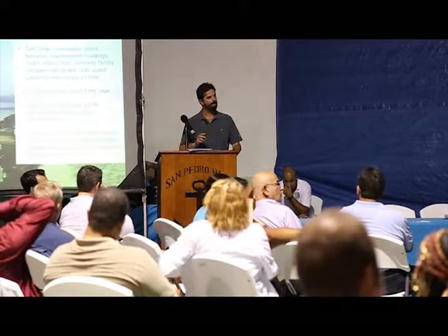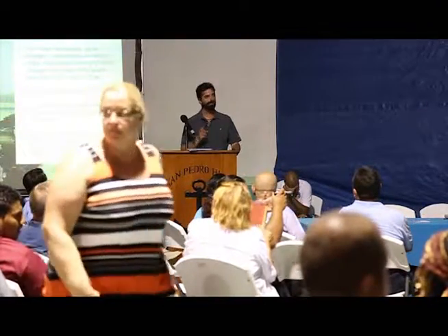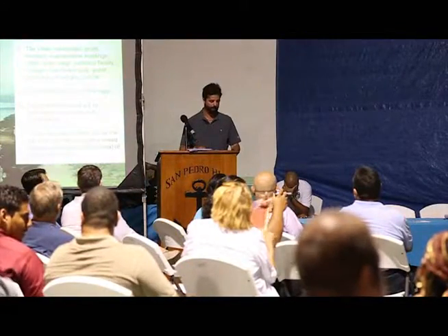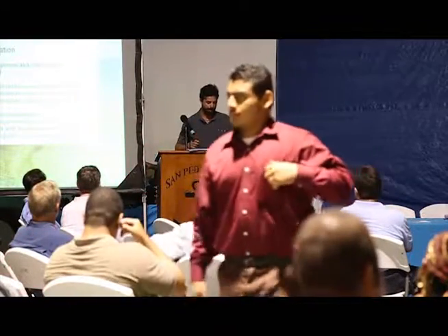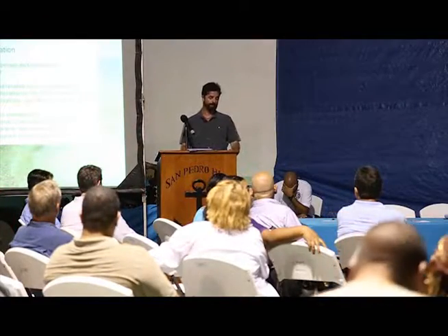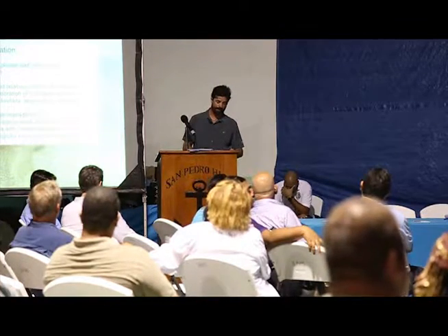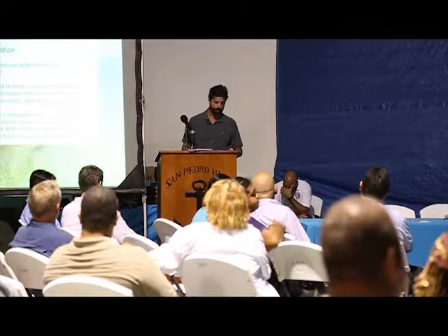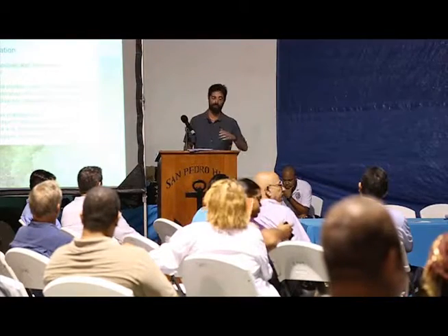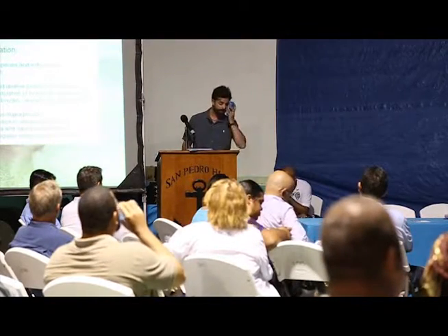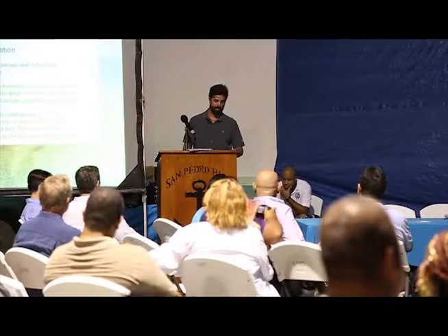The program of Blackadore will occupy the 25% of the area of the key, and the rest of it will be devoted to restoration and conservation. The pre-identified impacts derived from construction will be expressed further in following slides, but I can address the following. We're going to identify relevant species and individuals to be protected during the construction. Most of them will be transplanted and placed on an on-site nursery, where we will be also propagating native species, and the structure and composition of the revegetation will also come from our restorative principles.